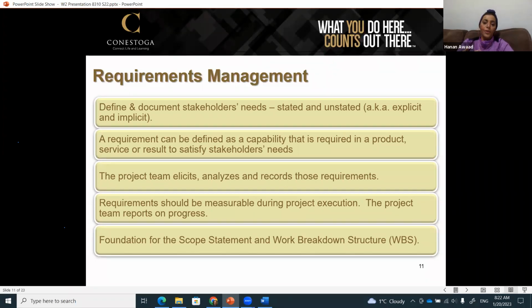The more time and effort you spend on defining and refining your requirements, the more managing the project will be easier. The more communication will become easier. This is very important. Requirements should be measurable. So we have to attach some sort of a matrix or a metric to our requirements, so we totally understand if we are achieving this requirement or not.